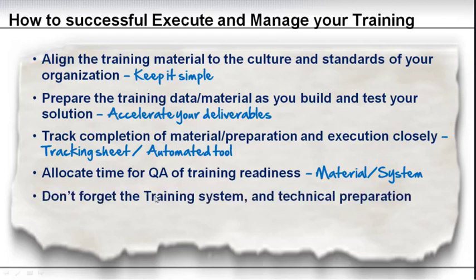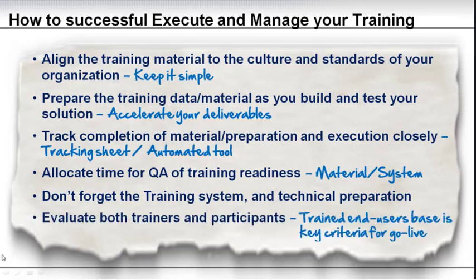And don't forget, again, it's said in the QA, but don't forget the training system itself and the technical preparation. There's nothing worse than the system is not there, the data is not there, or the students who are in the classroom ready to learn cannot log on. So test the technical system and the preparation of the system.